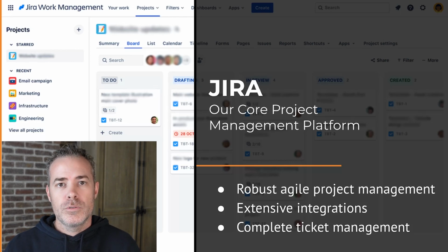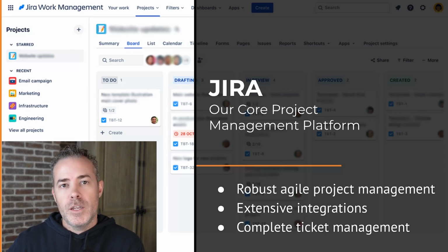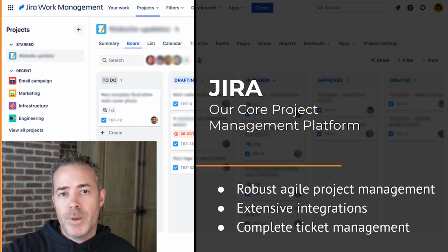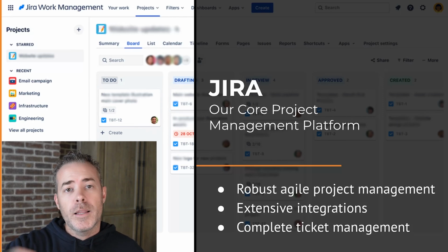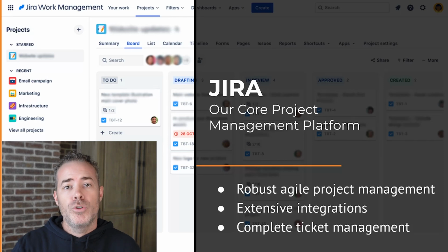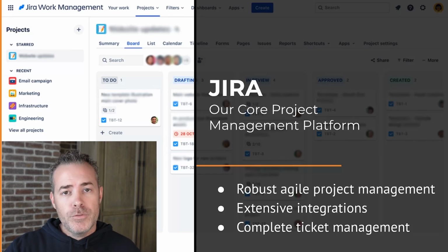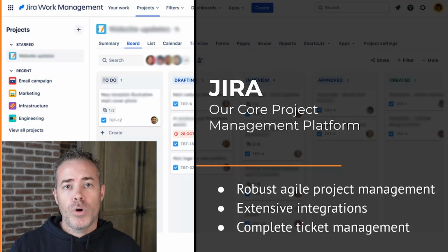So the backlog tool has a pretty good feature where you can create your epics, which are the bigger bodies of work, and then you can create the associated user stories and tasks that go along with that, and map them to the epics. The epic view will give you a more high level picture of where you are at a broad view, and then the backlog will help you break that into the smaller work items so you can really detail those out.